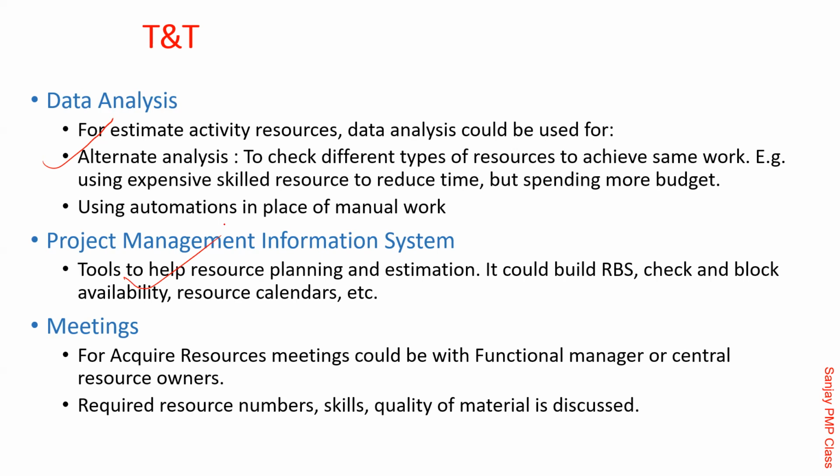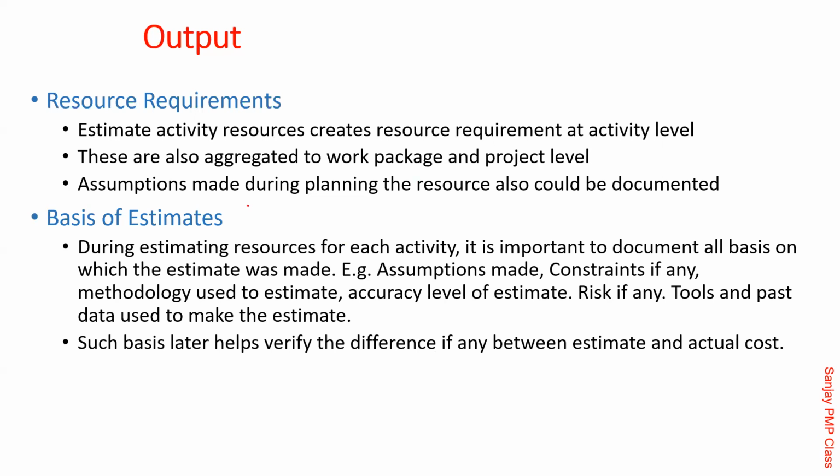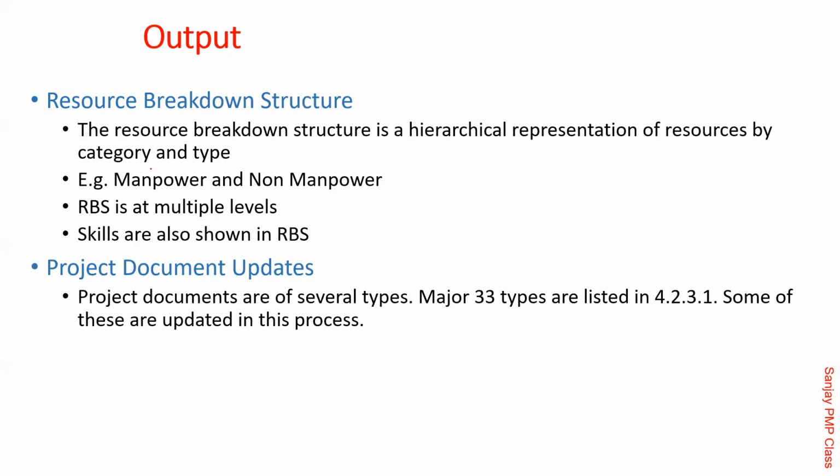Project management information system: any systems which you are using, for example, for creating the project plan, for raising the resource acquisition, or putting in the requirement job description. So there will be multiple systems. They are all called PMIS. And the output will be the resource requirements: which resources are required, when they are required, what is the quantity, what is their skill, what is their grade, and so on. Do you want them on board, on contract, whatever? And similarly, basis of estimate, whatever your assumptions are. So this was the thing.